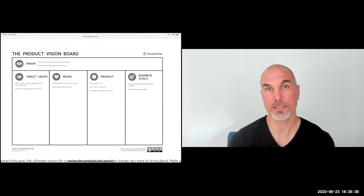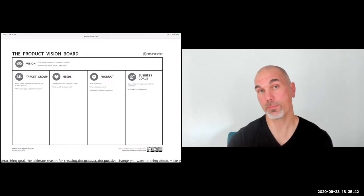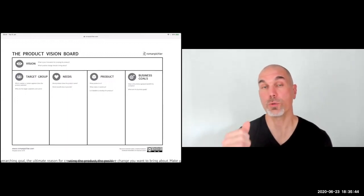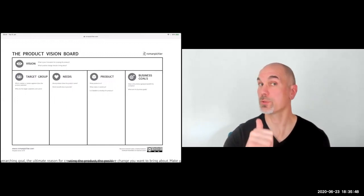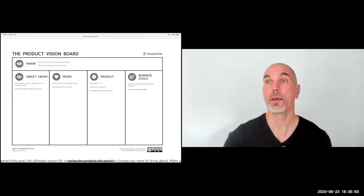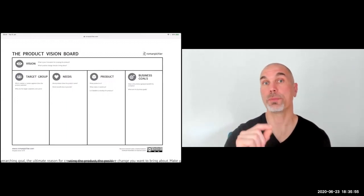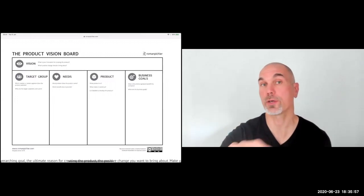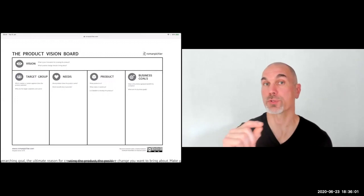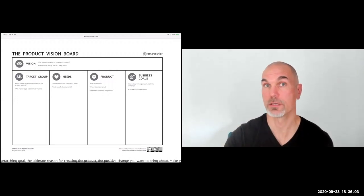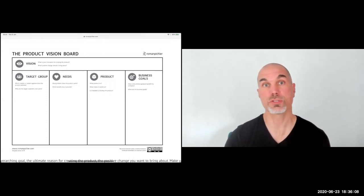You don't want to overdo the discovery, but at the same token you don't want to rush into development. From a Scrum perspective, if you don't know who the users and customers are, if you don't know why they would want to use or pay for the product, if you don't know why people will choose your product over a competing one, and if you don't know how the product is going to benefit your business — you're not in a position to populate the product backlog.